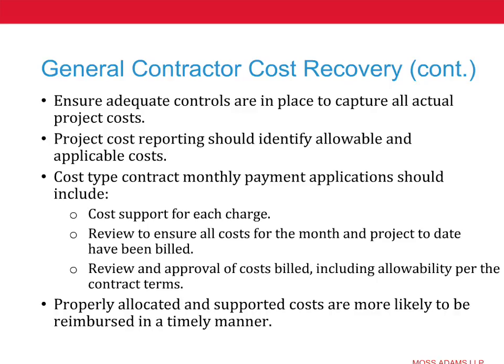In terms of monthly payment applications, just be sure there's cost support for every charge. These are kind of common issues, and these are things we run across, and we're often asked by audit and tax and consulting clients and non-clients to review a specific cumulative billing to help ensure controls are working. And when we do that, we often find that the billings are incomplete and that they don't match the contract terms, and believe it or not, that's more common than you might think.